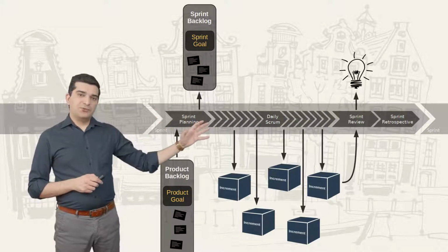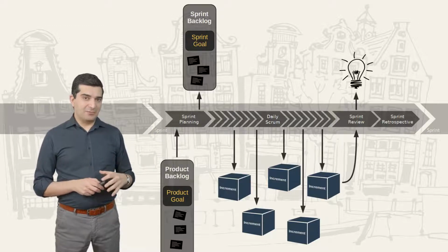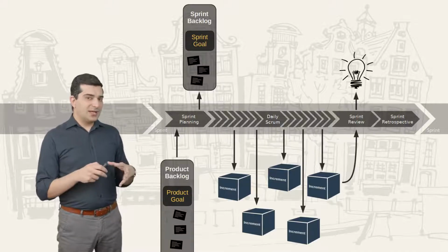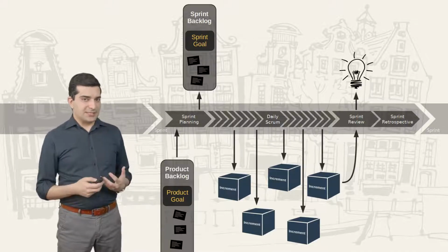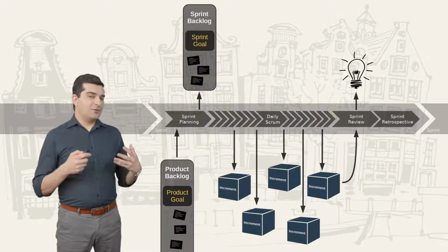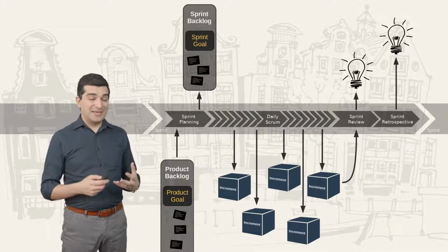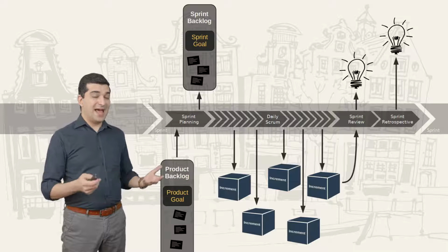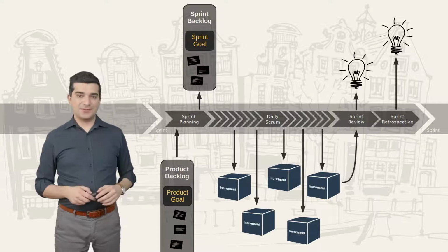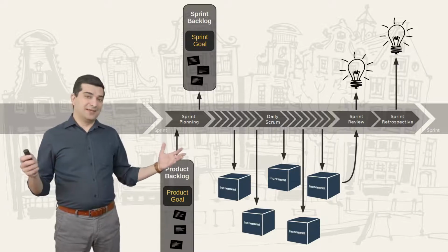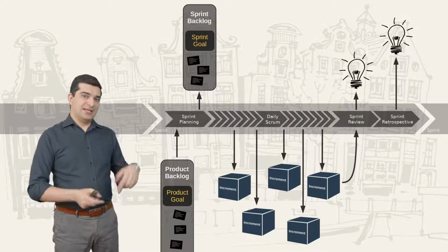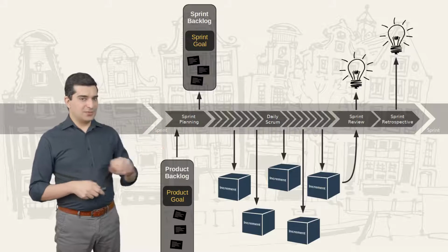After that, we have a sprint retrospective. That's only for the team, the Scrum Master, the product owner, and the developers. It's not about other people. They get together and think about the process, the way they've been working together. And the main question is, how can we become better the next sprint? They plan one or a few improvements, and that's what they're going to do in the next sprint. So that's everything about events, but really, really short. In the next lesson, we're going to go through each of those things.